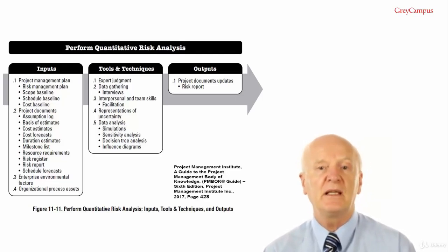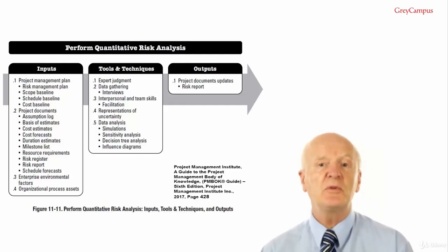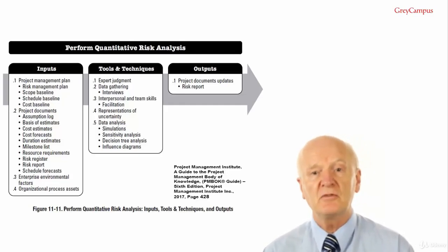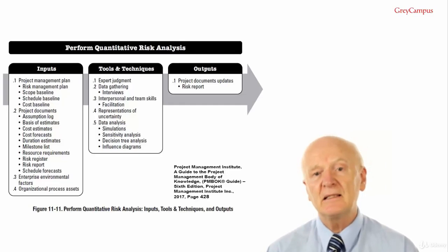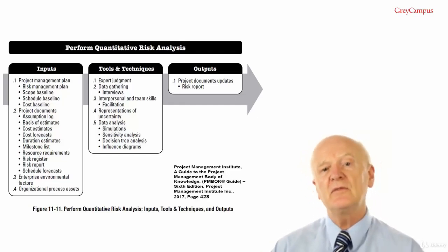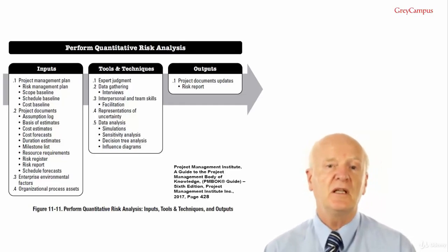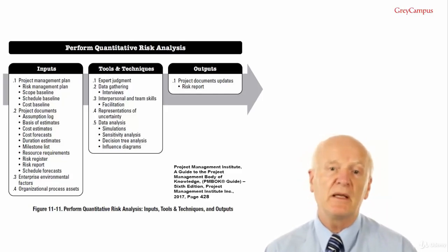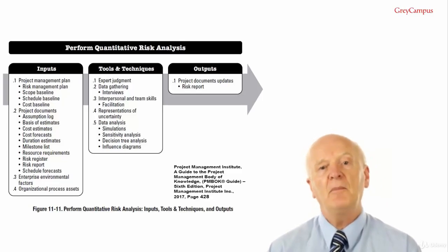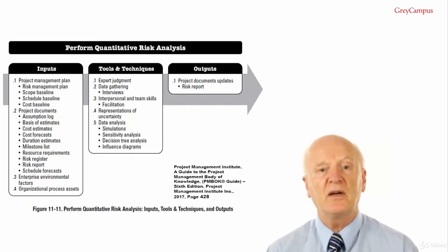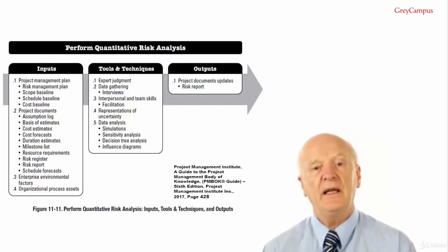Detailed probabilistic analysis of the project. Key outputs from the quantitative risk analysis are presented, such as S-curves, tornado diagrams, criticality analysis, together with a narrative interpretation of the results. Possible detailed results of a quantitative risk analysis may include amount of contingency reserve needed to provide a specified level of confidence.